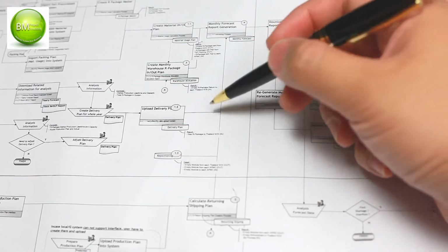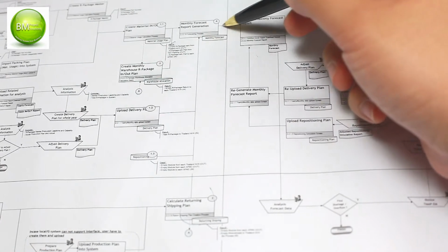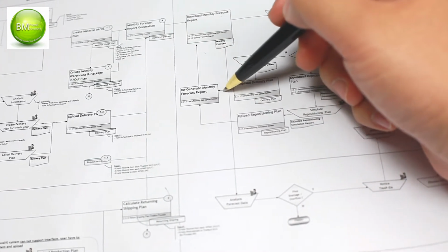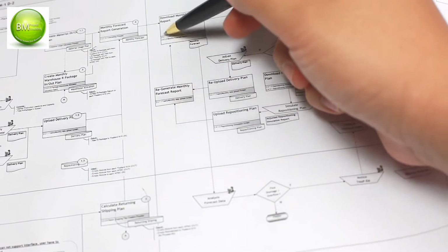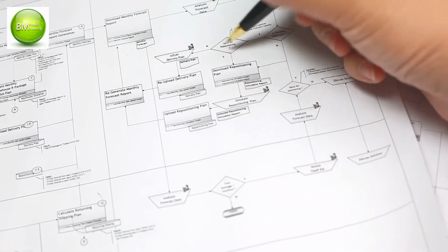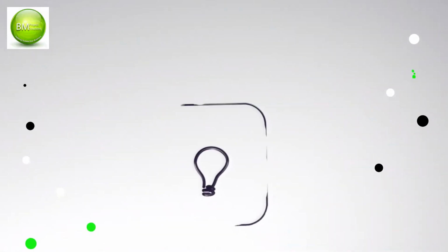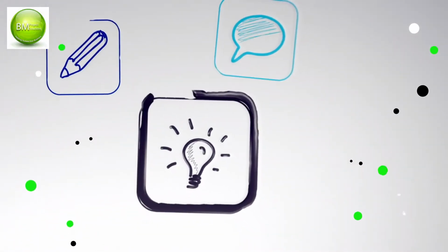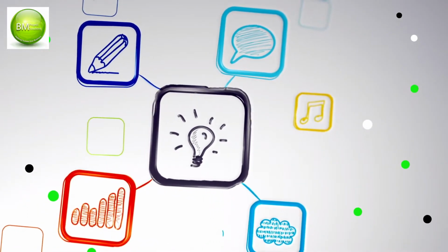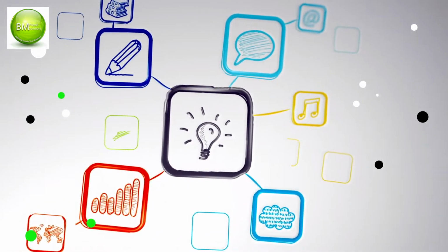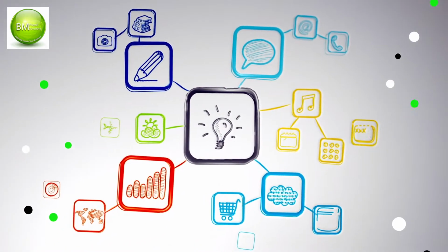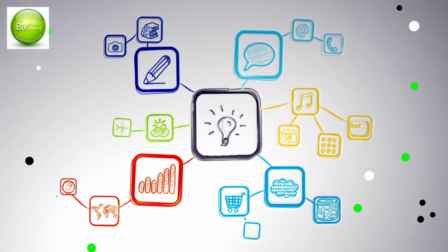Agile development is a team-based approach to software development that stresses the speedy release of a functional application while focusing on customer satisfaction. It establishes a sprint, which is a time-boxed phase with a 2-week duration. A list of deliverables is prioritized based on client feedback at the start of each sprint. The developers and the client analyze and assess the work at the conclusion of the sprint, making suggestions for future sprints.